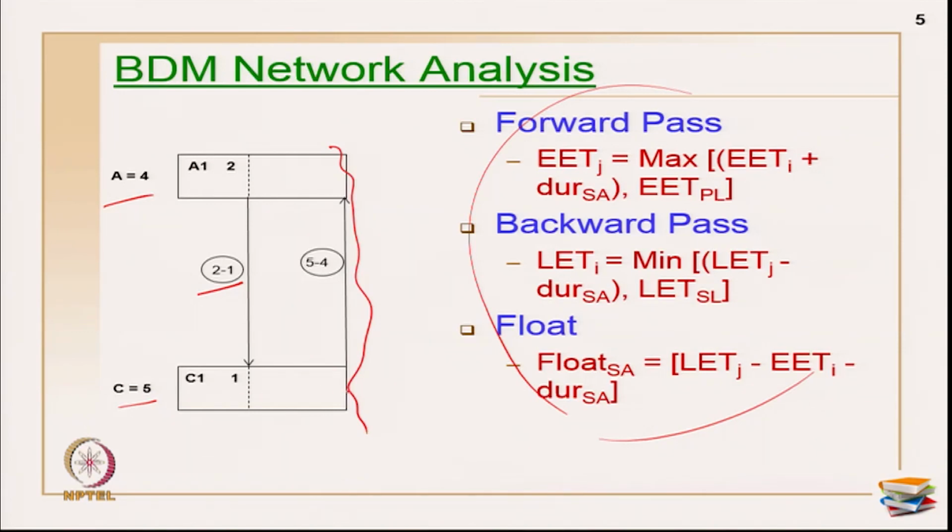Now my next link from here. At the time of 5-4, which implies from the starting point the duration of this is 5, and from the starting point the duration of this is 4. That is how the notation reads. So, which implies now what is the duration of my sub portions. C2 is a subactivity here, duration of the subactivity is 4, A2 is a subactivity with the A, and the duration of the subactivity is now 2. Now, let us move on with calculating my forward pass and backward pass.